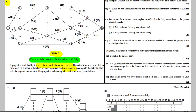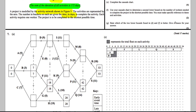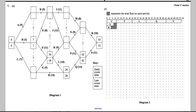For part A, complete Diagram 1 in the answer book to show the early event and late event times. The early event times are along the top and we do a forward pass. The late event times are at the bottom and we do a backwards pass. When going forwards, we're looking for the biggest number we can get to on top.